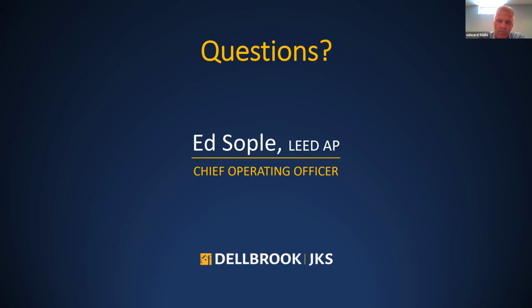I always refer back to when LEED was a big deal. Back in the day, everybody freaked out about LEED this and LEED that, and there was a gazillion dollars. And then come to find out, now it's just common, typical practice with the new energy code, with all these towns, whether it's stretch code or the new energy code, as long as you get a VRF system with good controls, with a good control contractor. That's another thing: not only AeroSeal for your HVAC contractor, but try to get your HVAC contractor to sub out their controls so they don't try to do it with their typical ductwork guy. That's another big lesson learned for us.